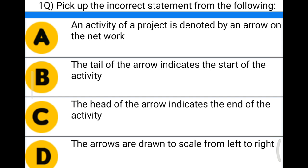Option A: an activity of the project is denoted by an arrow on the network. Option B: the tail of the arrow indicates the start of the activity. Option C: the head of the arrow indicates the end of the activity. Option D: the arrows are drawn to scale from left to right. The correct answer is Option D — the arrows are not drawn to scale.